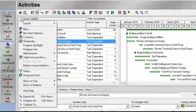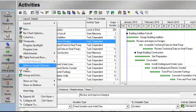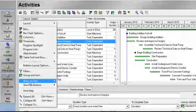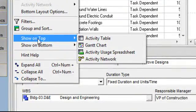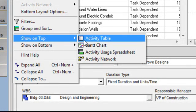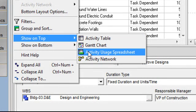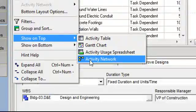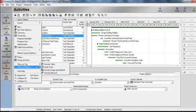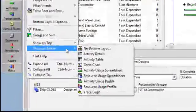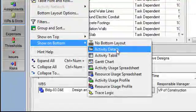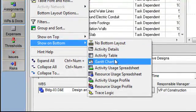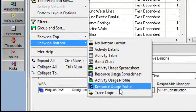If I go to my Layout Options bar, I can scroll down and view those items which I can quickly show on the top layout. That includes Activity table, Gantt chart, Activity usage spreadsheet, and the Activity network. I can also change what's shown on the bottom — I can say I don't even want to see a bottom layout, but then I can select from Activity details, Table, Gantt chart, various spreadsheets, and profiles.